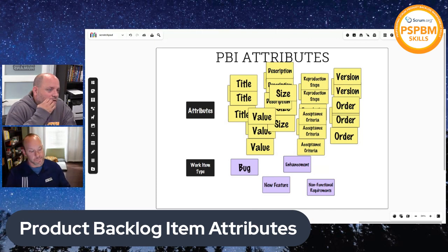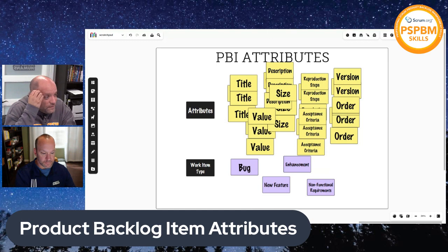Yeah. And I'll give you all a kind of a guiding principle here that's completely made up, not scientifically rooted, and you're welcome to ignore. But if you have more than 5 required attributes for a PBI, you need to rethink that. Yeah. And take a hard look at what you're doing and try to get it down to 5 as soon as possible. Scrum Masters, that's an impediment that you need to remove. Get it down to 5 or less, 5 or fewer, I should say.